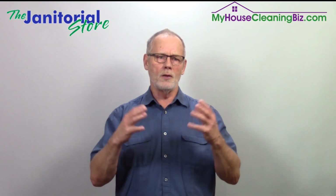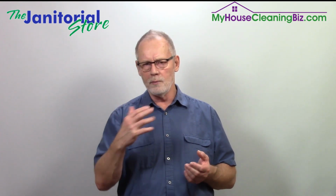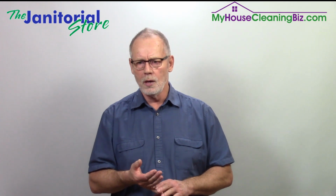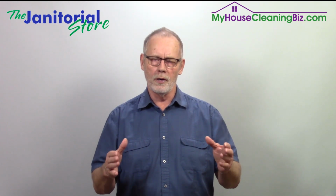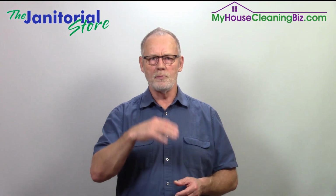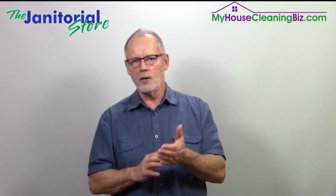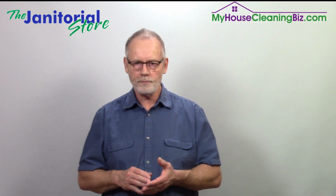Because typically, once you've done the walkthrough, gathered your information, and made all your notes, you want to let that contact person know that you're going to go back through and measure the floor surfaces. The reason you're doing that is because, especially if you're a full service company and you're going to provide floor care services, we need to know the square footage of the carpet, the square footage of the hard floor, and what type of hard floor we have in the facility. We also have to count the panes of the windows, because we charge by the pane when we're doing windows. So we want to count all the panes and see how easy they are to get access to, because the harder they are to get access to, the higher the price to clean them is. So those are the things that you want to do.